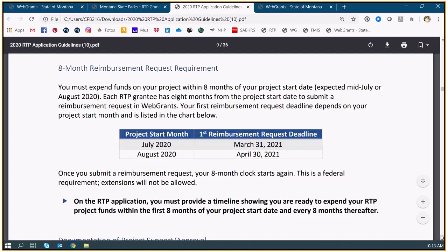Yes. Thank you, Cliff. That's a really good way to do it too. If you're a grantee who's got multiple grants going, as long as the expense is within what was approved in your funding strategy narrative, which in your case it would be because you're getting a grant essentially every year for grooming activities, then normally you would put it towards your 2019 grant and expend those funds first, but you could take one chunk of a payment and put it under the 2020 grant, so you can hit that reimbursement request deadline and then bridge it to when you expend those 2020 funds.